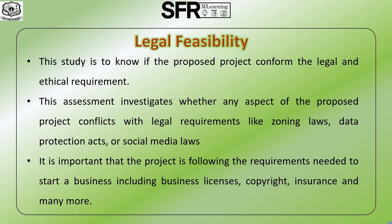Third is Legal feasibility study. This study determines whether the proposed project conforms to legal and ethical requirements. This assessment investigates whether any aspect of the proposed project conflicts with legal requirements like zoning laws, data protection acts, or social media laws. It is important to highlight that the project follows the requirements needed to start a business, including business license, copyright, insurance, and many others.